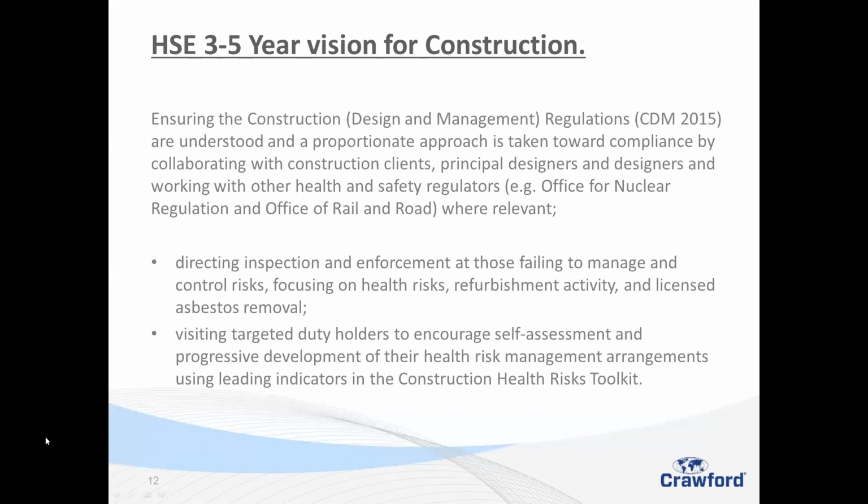Okay. Coming to PD responsibility, what is the extent of the PD responsibility to monitor the project they have been employed on? With the PD's role, firstly, it should be due diligence all the way up to when the actual principal contractor takes control of the site. And then we need to ensure, depending on what type of project it is, how much support, guidance, and even inspections need to be put in place.